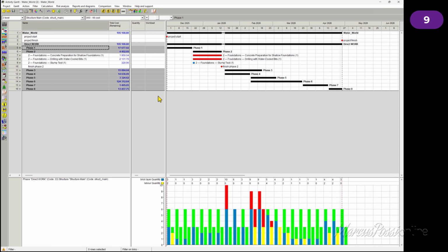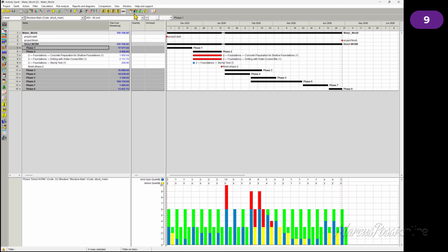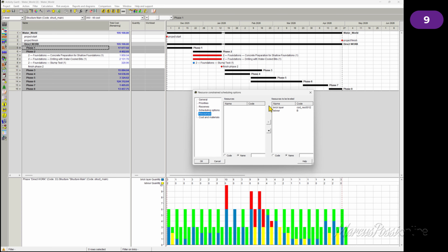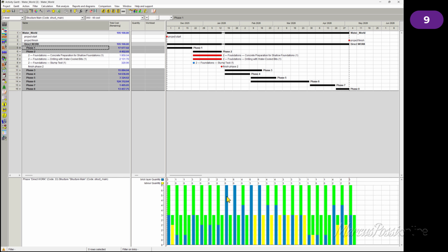We will see next Friday that instead of calculating by CPM, you could calculate your schedule by how much resource you really have to work. If you schedule by resources, you see that the resource columns are not red, they are just blue or yellow, and there is even space for other activities for our people.